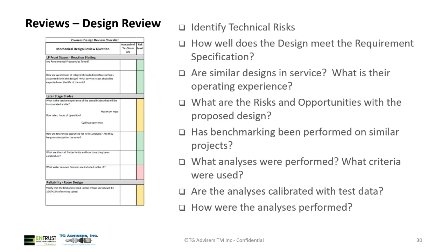We need to vet, are there similar designs? Are we the first one getting this size or style of unit? What's the operating history? What kind of risks, opportunities are there out there still with this design? Have they been benchmarked on similar projects? What analyses were done to dictate some of the design factors and what criteria is being used? Is the analysis calibrated with test data? Is it based primarily on calculations? How was it derived, and how was the analysis performed?